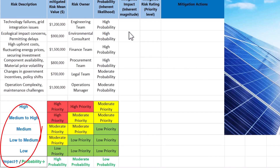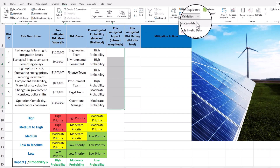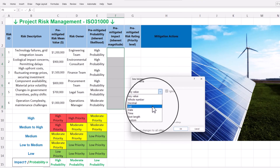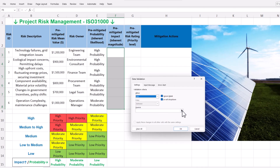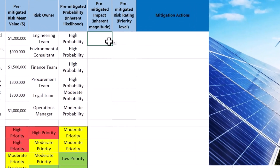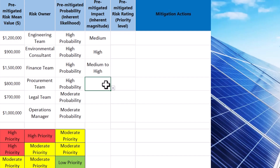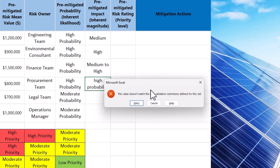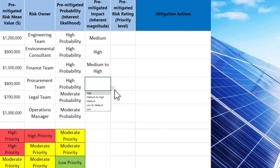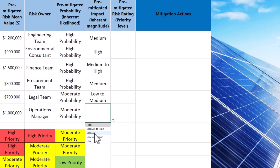We follow the same procedure for pre-mitigated impact or inherent risk consequence. Select the relevant cells, navigate to the Data tab, and select Data Validation. Under validation criteria, select List, then specify the data source by selecting our defined impact values on the project risk matrix. The drop-down menu contains five possible risk impacts. An error message appears if we try to violate the validation criteria by typing a value outside the predefined list. Data validation with drop-down lists ensures consistency, accuracy and efficiency by standardizing risk impact and likelihood selection, reducing input errors and subjectivity.